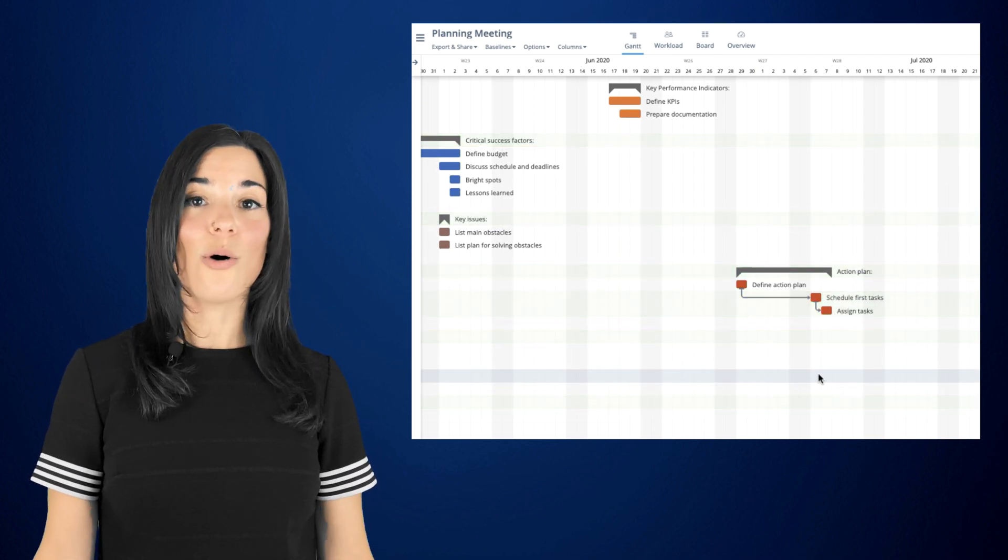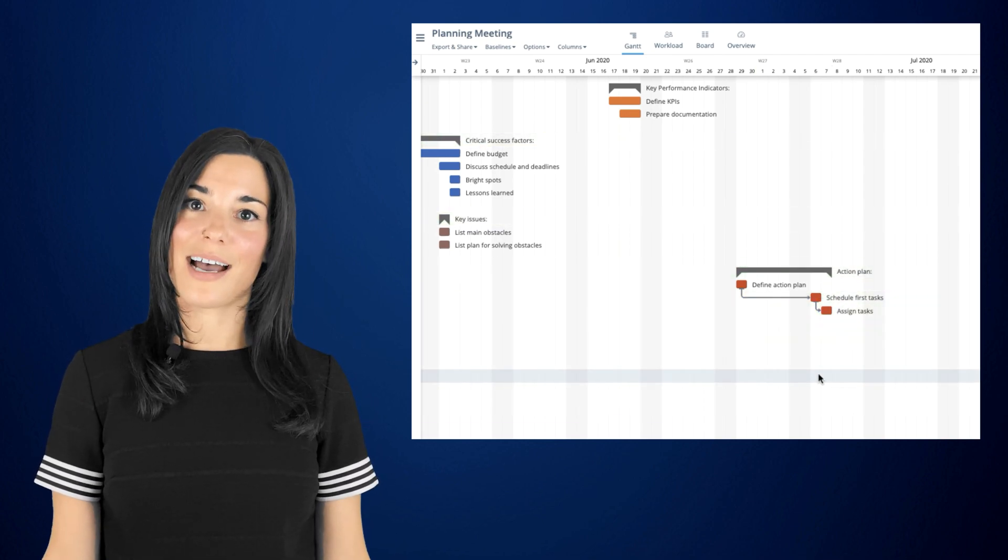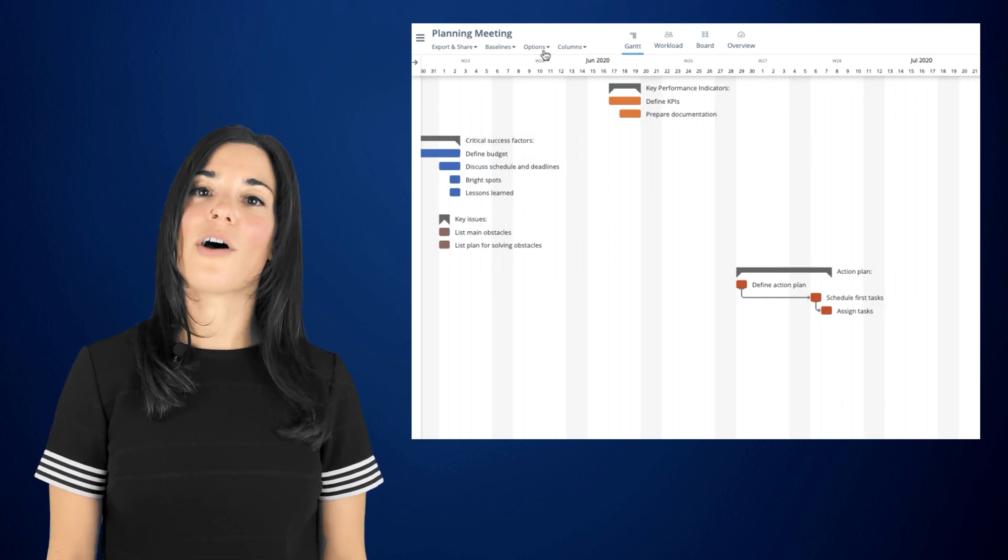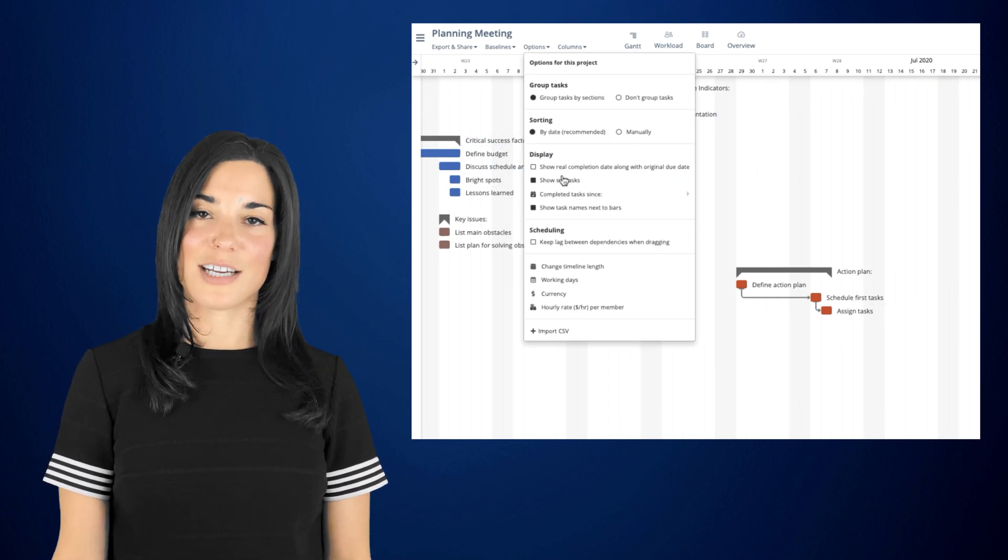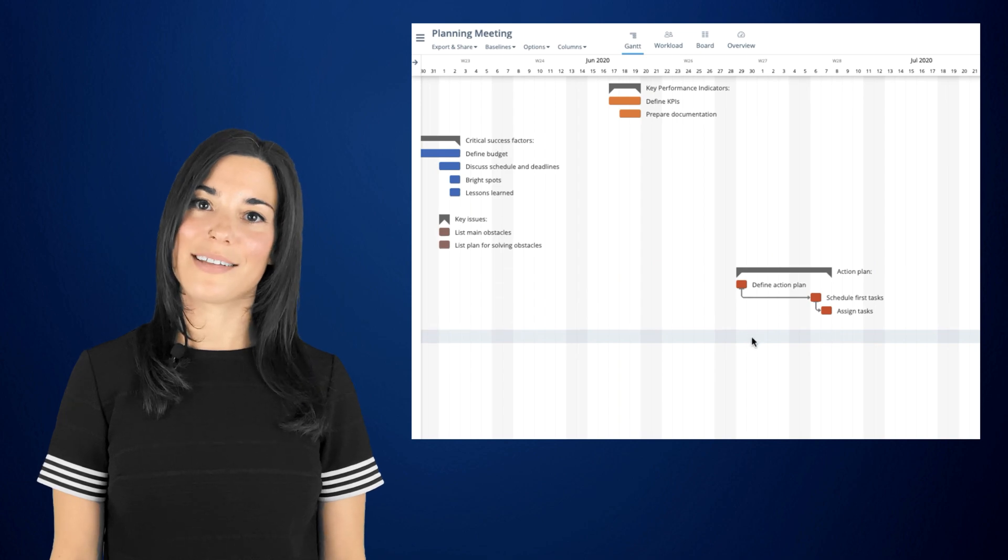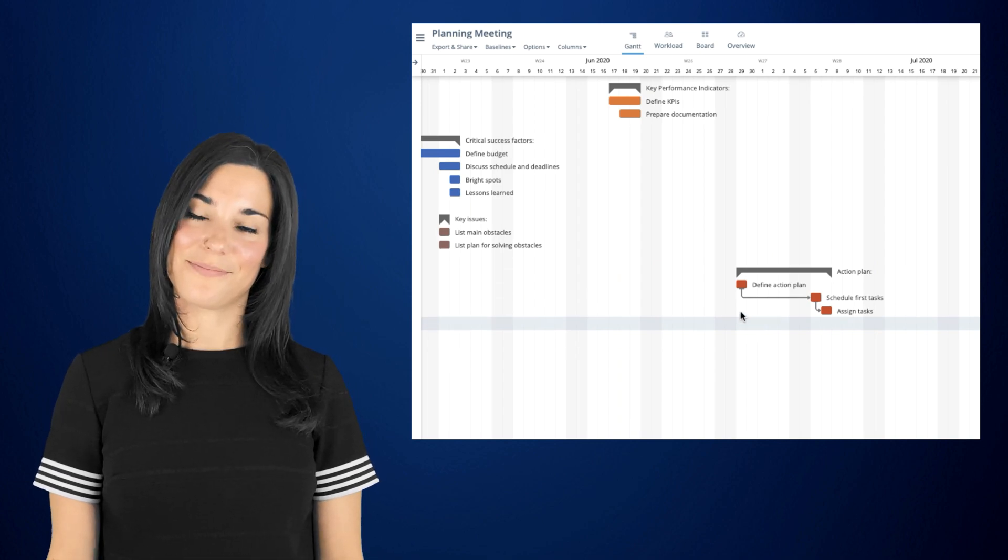In case you always want the dependent tasks to move together, you can click on options, scheduling, and then select keep lag between dependencies when dragging.